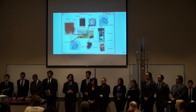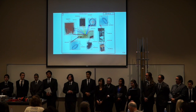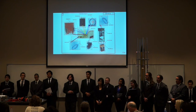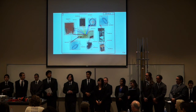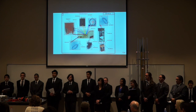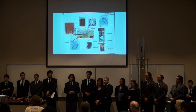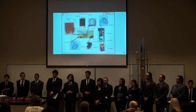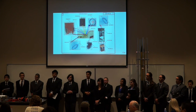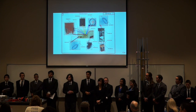So another thing, configuration management, outstanding job. It looked great. That's sort of my background. I enjoyed that you have great product lifecycle management with your product structure trees, your drawing trees, and the bill of materials. One thing that I don't see is how the requirements are managed. A lot of times requirements management is a huge part of any project, and I see requirements scattered through here, but I don't see requirements documents that are managed with change control over them.